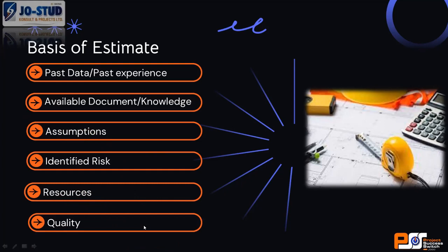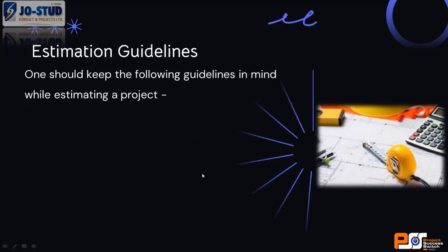And like I said, I will now state in that same document, especially if it's a building, I will now state, okay, I said I used 800 million to do 248 units. I will now state the quality we agreed with the client. I will say 185 was finished to spec with POP or PVC ceiling or cement fiber ceiling. I will now say 63 were carcass finished externally with casement window, but internally was on plaster or on render. Those kind of things save you stress and give you a good basis of estimate.